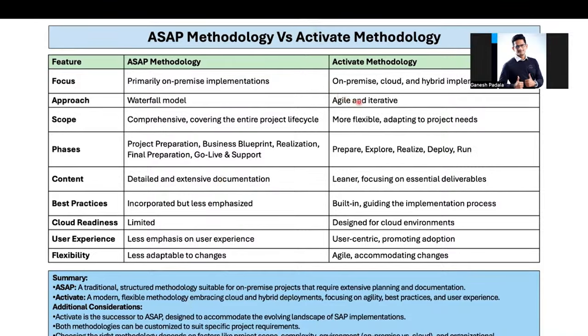Okay, and the sprint concept also in public cloud might be possible for certain areas. When I was working on one project, we had both SAP and Salesforce simultaneously. For SAP, the entire thing was moved almost like a waterfall. Although we had sprints, the entire configuration setup, everything was moved during the go live, the final preparation time. But Salesforce used to move batch-wise to production.